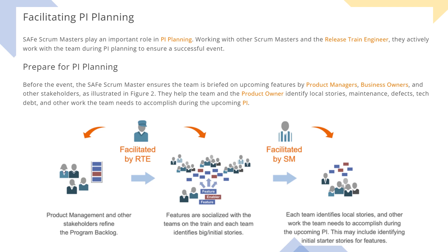They help the teams in preparing for PI planning before the event. The SAFe Scrum Master ensures the team is briefed on upcoming features by the product managers, business owners, and other stakeholders. As illustrated in this picture, they help the team and the product owner to identify local stories, maintenance defects, technical debt, and other work the team needs to accomplish during the upcoming PI.